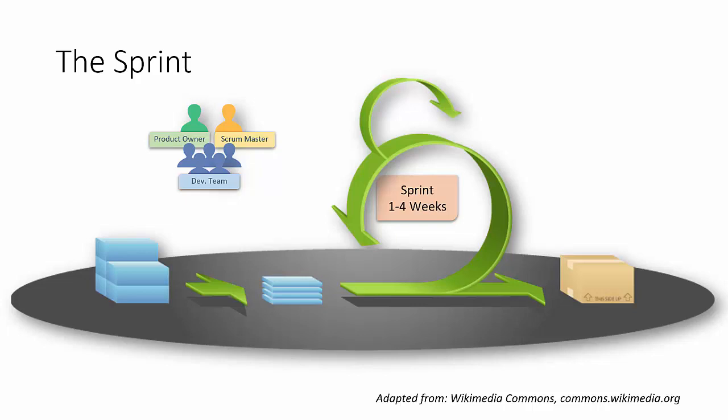The flow of work starts with the product backlog, which is owned by the product owner. The product owner decides what's in the product backlog, meaning there's a long list of the work that needs to be done, and this long list of work is prioritized. On the top, you have the most urgent things, the most valuable elements, what brings most value to the customer, and further down, the value decreases.